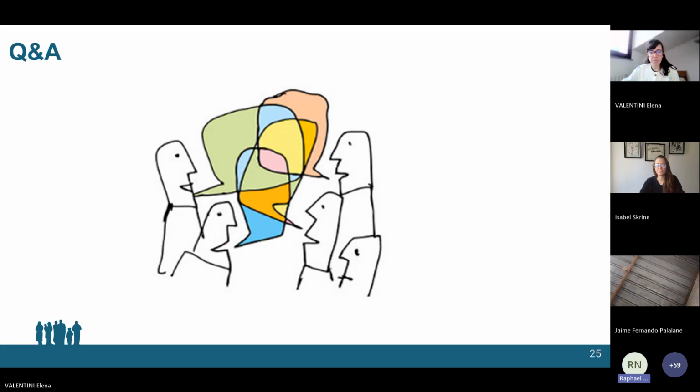Yes, thank you so much, Elena, again. I just want to comment on this point because it's very important. From previous experience where we implemented the area-based approach with the Community Resource Center, we refer to it as UDOC Center, but it performed the same function. One of the key challenges is that when we wanted to phase out, we could not hand over this community center to the people because it is funded. We pay rent for it yearly, and the community could not afford that. Even though it is very important for the community because coordination was easy, and we were able to link it closer to all the neighborhoods we're working with, it's difficult to continue because the community could not afford it.